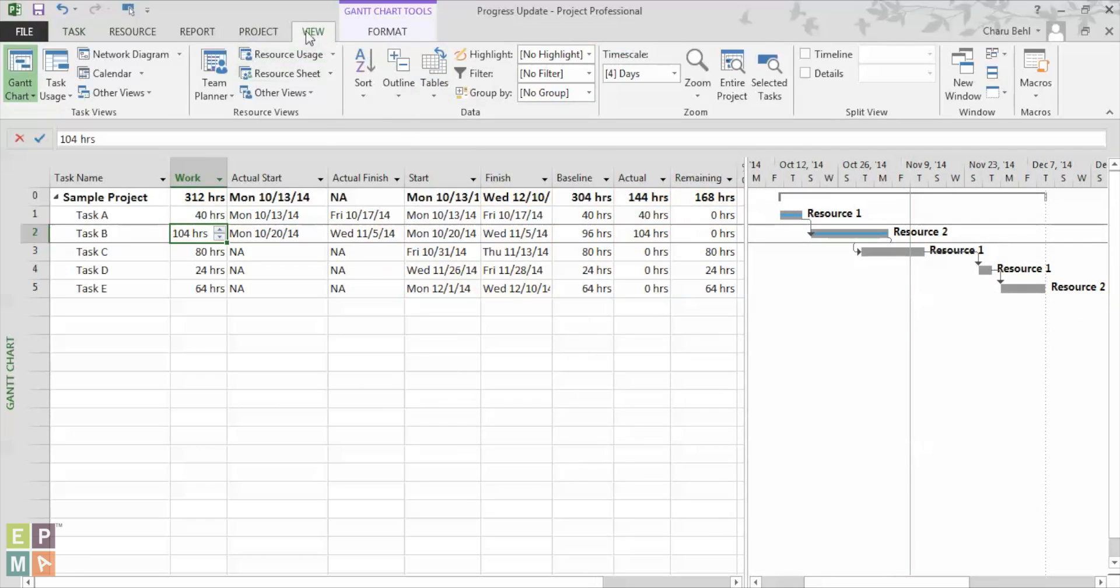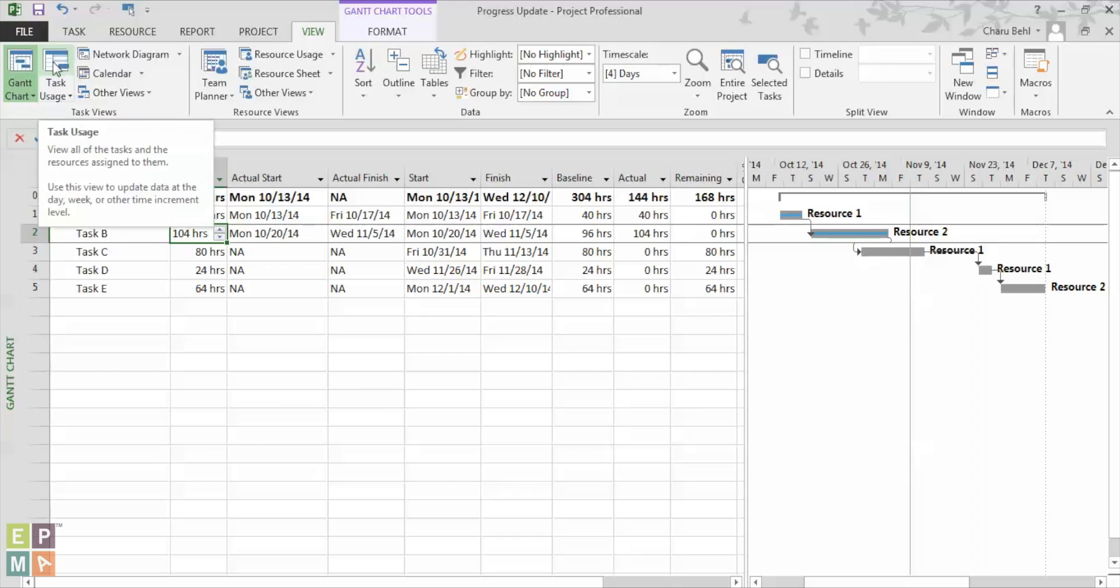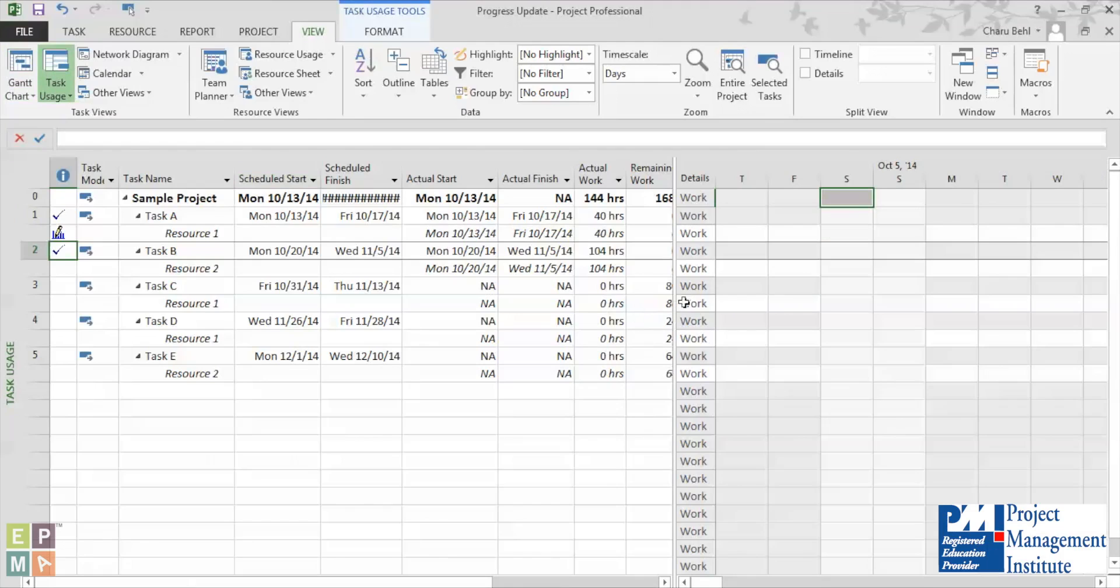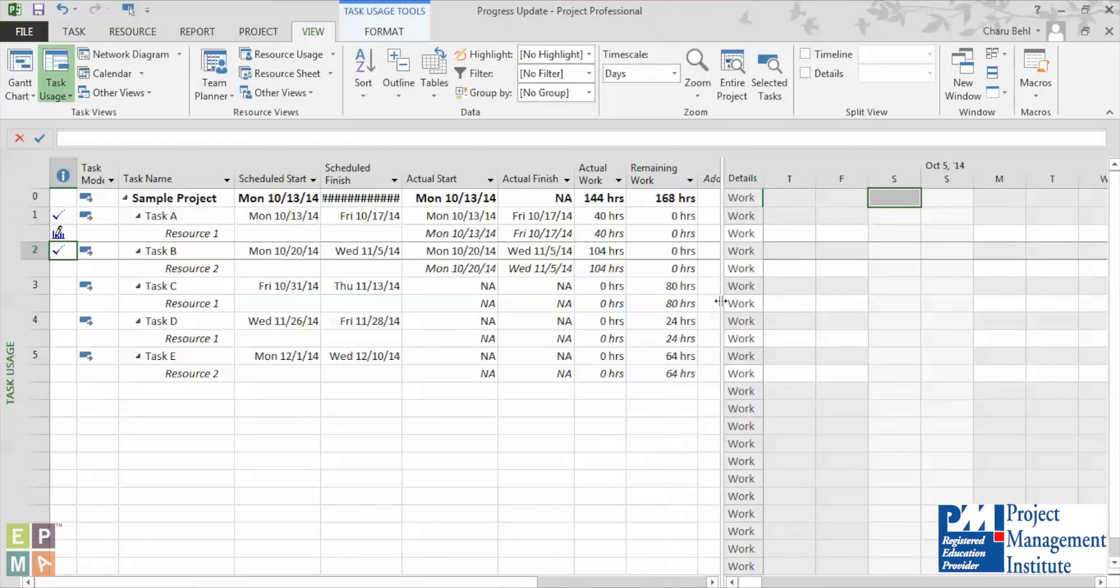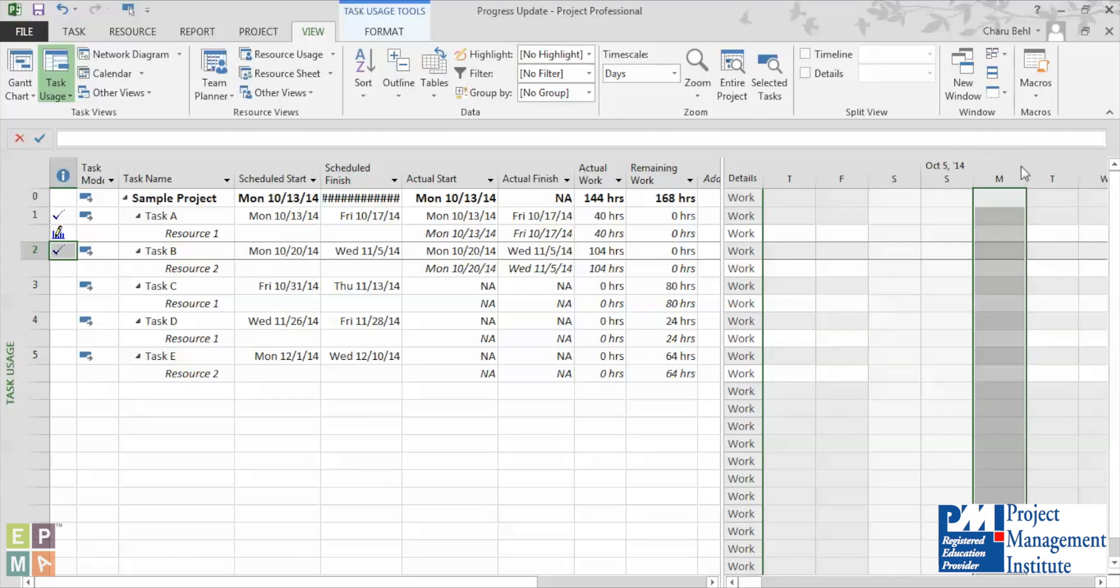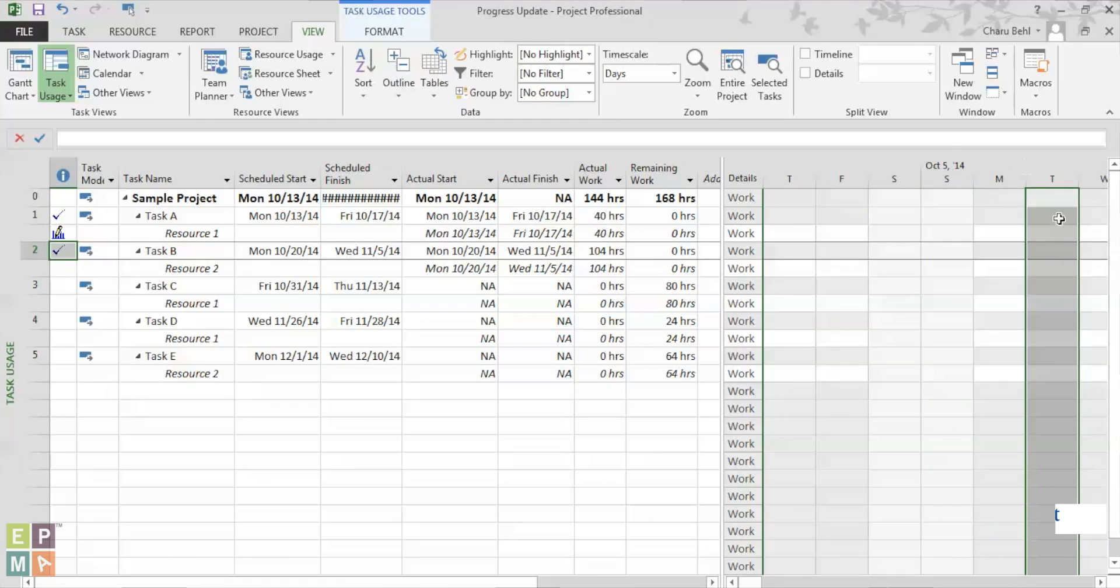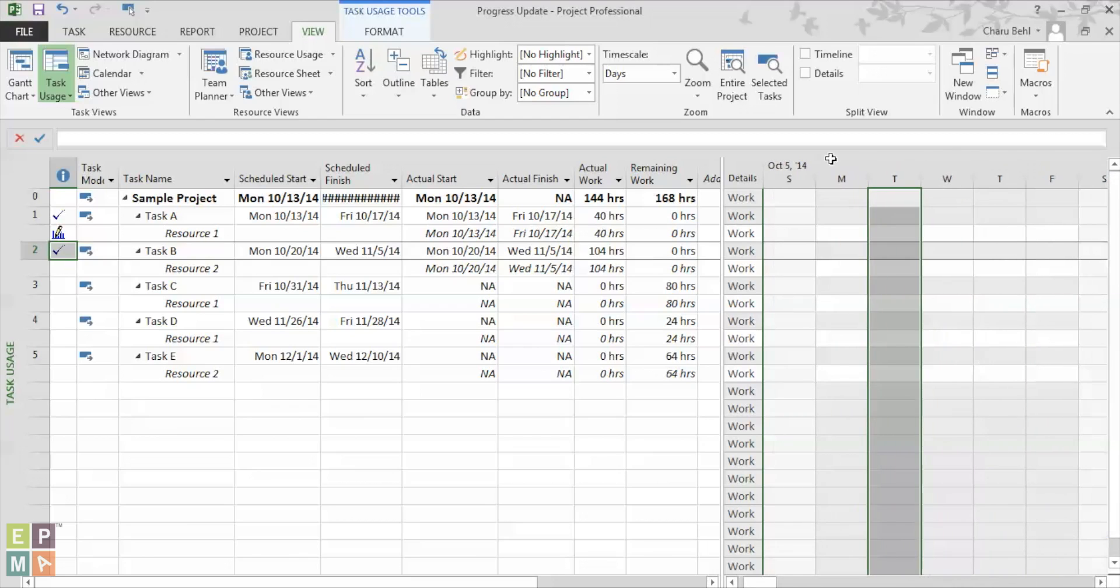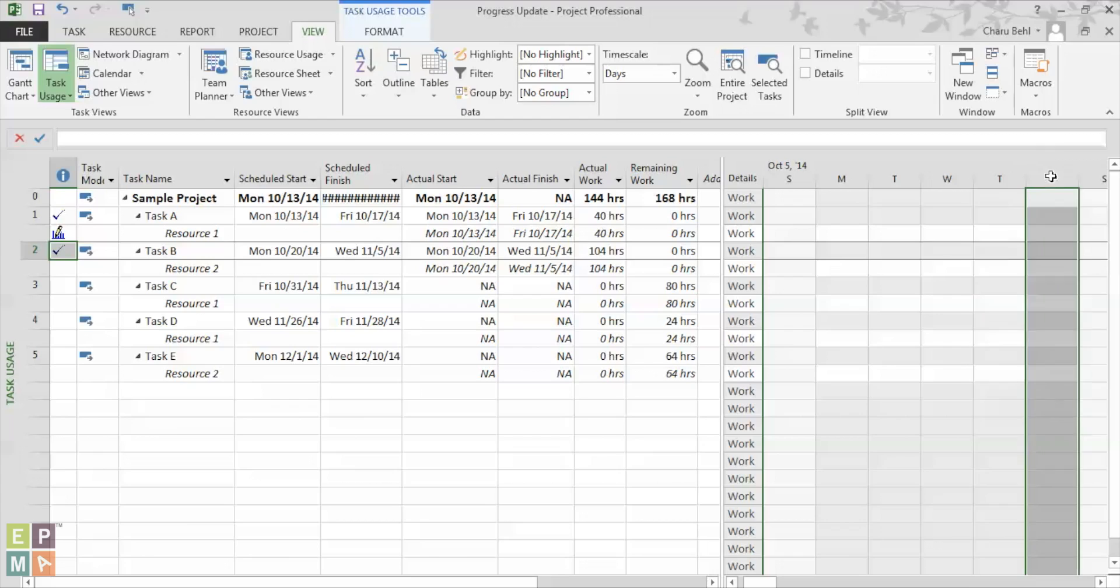And now under the view, I would select my task usage view. And okay, so now you see on the right hand side, how my task is divided on basis of day. So now the manager or the scheduler has the ability to break it down to the number of days and there's an increased granularity to the whole process.